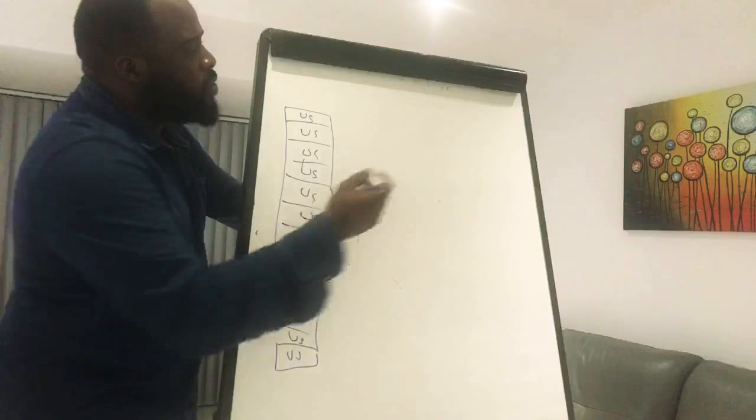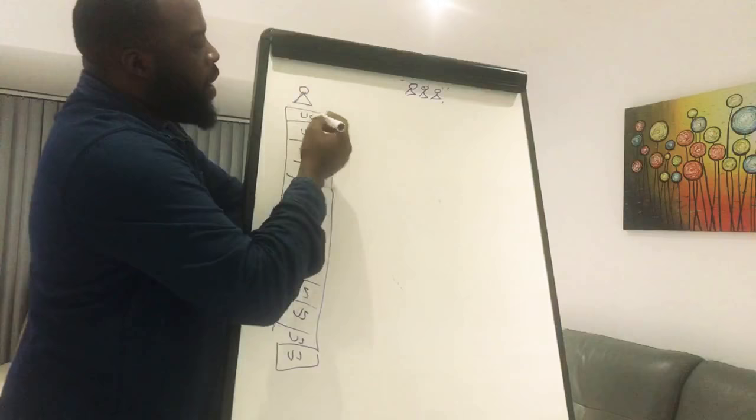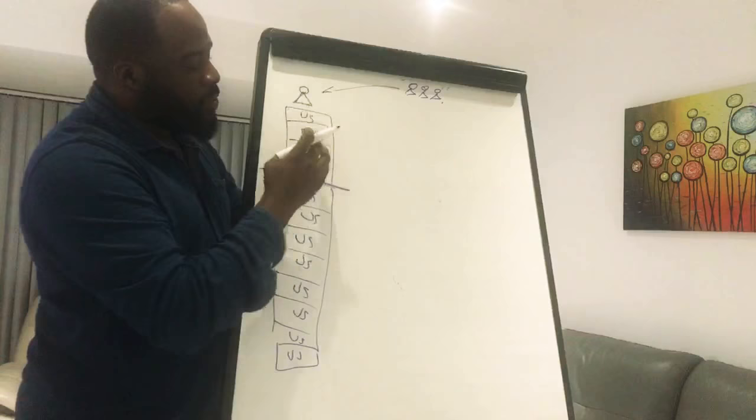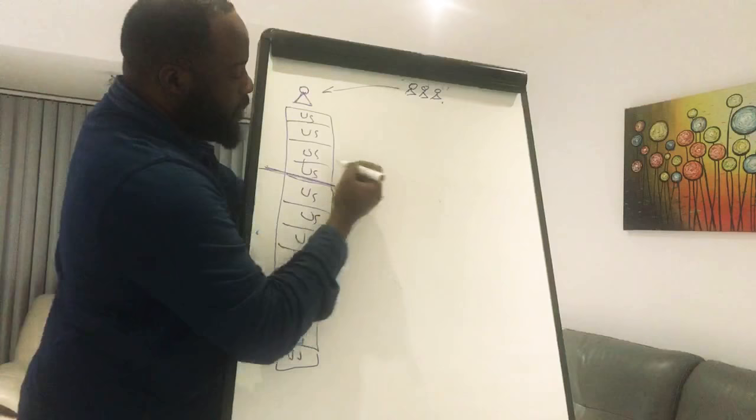Okay, good. So you just imagine that you have your stakeholders over here, and then you have this lovely product owner over here, and after speaking to the stakeholders, he realizes that the most important things that need to be delivered within the next 4 to 8 weeks, after he has prioritized his backlog, is this set of user stories. Well, that is really good, isn't it? So let us go through the process for this set of user stories, and this set is what we call a sprint, okay?